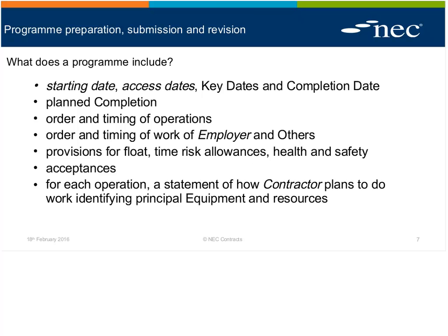Okay. So why do we have to show acceptance in the program? I think it helps people, at least with their diary, if nothing else. And there's a logic, isn't there? There is. It's a, this is when I need these things to happen by the date. Fine. If you need that to happen by that date, you need to observe the fact that I've got 2, 4, 6, 8 or whatever it is weeks of reply to deal with. And of course, whether works information requires an acceptance of a design, for instance, might be a precondition for starting it. So yeah, absolutely.